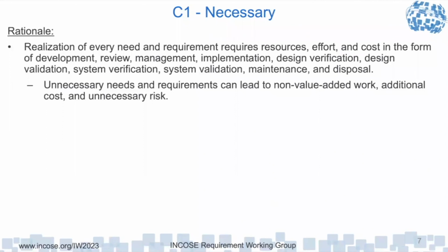And I got to thinking, if you look at the man hours that were taken developing the requirements the last 8 months and the hours we spent talking and discussing those requirements, each requirement probably represented $10,000 or more just in all the effort and everything. So by having too many requirements, it really does increase costs, and that's a good thing. Heinrich was talking about how he'd like to have a discussion on reducing the number of requirements.